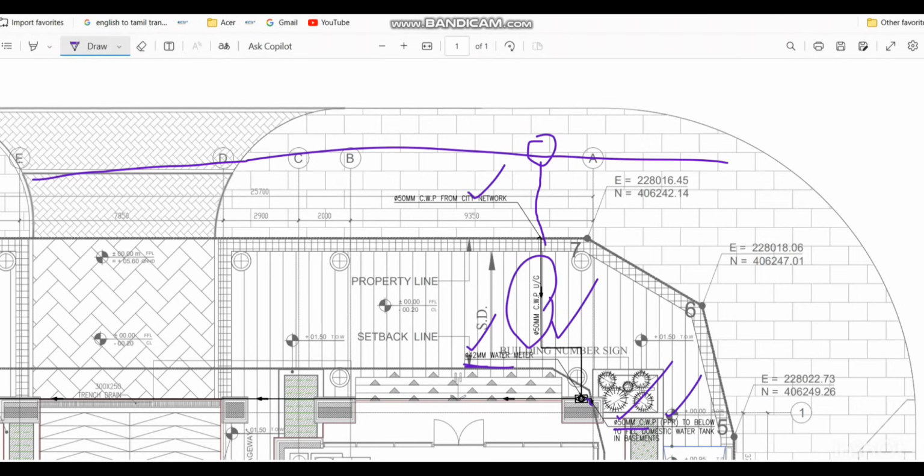And when it comes to connection with the existing line, before we cut the existing pipeline, there will be a high amount of pressure, with water passing through the line. So we have to get permission from the authority before we make the connection with the existing line.